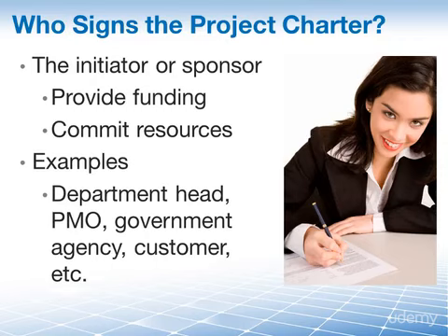They will tell you what projects they want, and they will authorize the projects that you will be doing for them. You can't turn this around. You can't go to your customer and tell them, hey, we thought up a great project and we have initiated it and you now have to pay for it. Well, that's really not going to fly. Therefore, someone outside of your company, of your project executing company, has to initiate and fund the project.